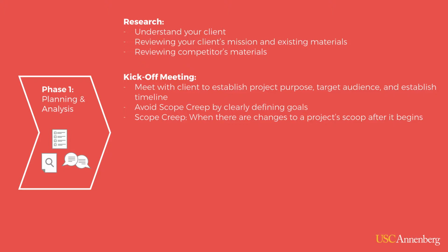When a project is not properly defined, documented, or controlled, this can lead to miscommunication and scope creep. What is scope creep? Well, scope creep is when there are changes to a project scope after it begins. Let's say a client says they'd like to add something else to the project later on, such as creating a magazine ad. You can say, well, we need to reevaluate our project plan to adjust, and it will potentially affect our timeline and costs. Ultimately, this helps avoid confusion and upset clients.